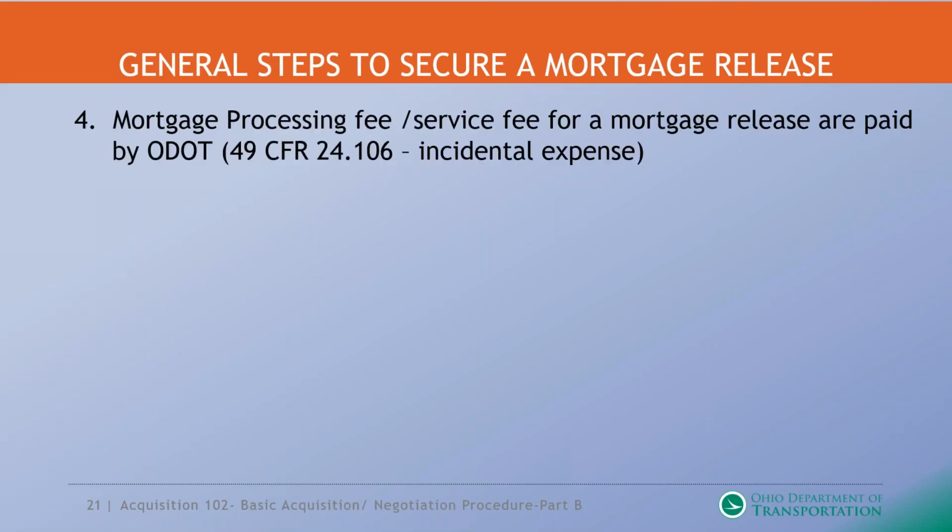Now, there is a processing fee. Not all mortgages have it, but there are some mortgages, a lot of mortgages, especially now, probably the majority of the mortgages do have processing fees that were required for getting a partial mortgage release. This is covered under 49 CFR 24.106 under the incidental expenses.